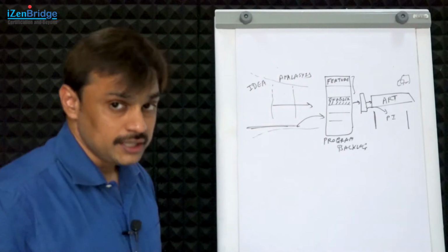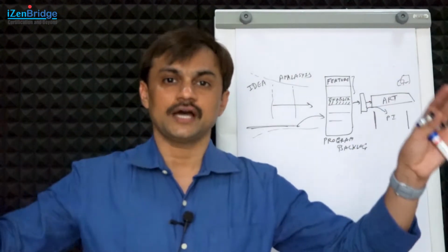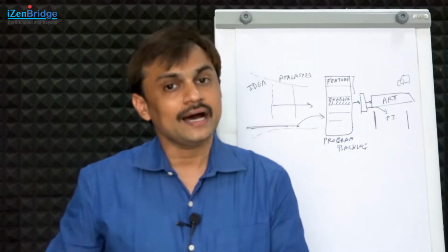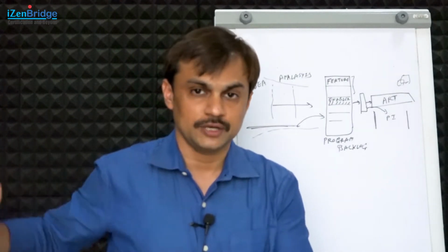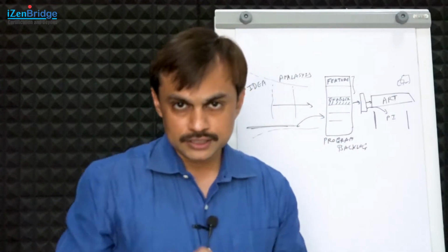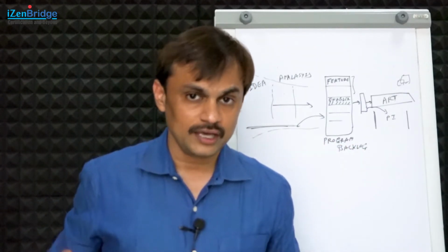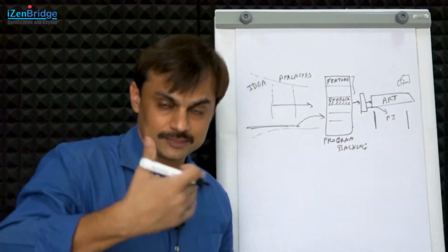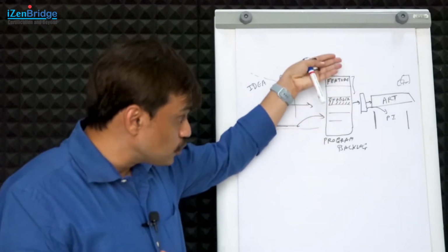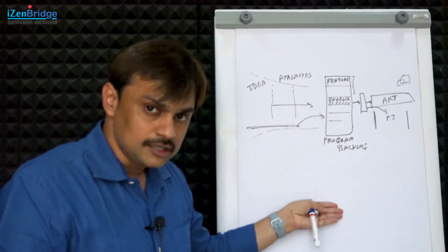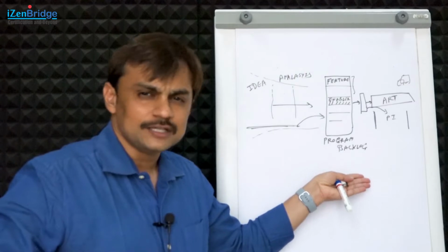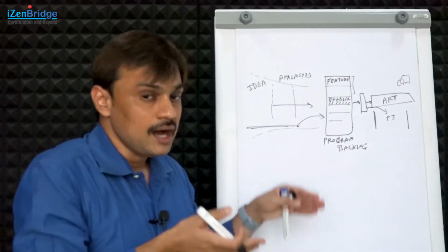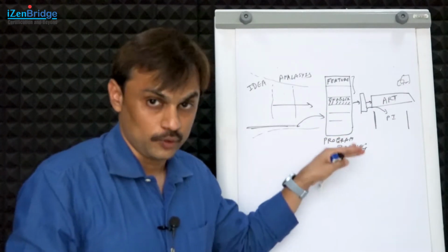I just want to mention here, don't think that I have an agile release train which is expected to deliver a particular product or solution, and I will prepare a program backlog or a release train backlog for them and give it to them. It is not expected to be done in that way. The program backlogs are expected to be just in time refined or explored. So we are not expected to put many features or enablers here. The features and enablers which are expected to come in maybe the upcoming one or two PIs, within your work in progress limits, are the ones which are resting in the program backlog.